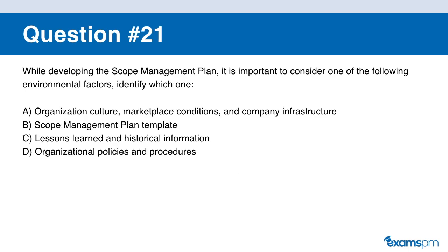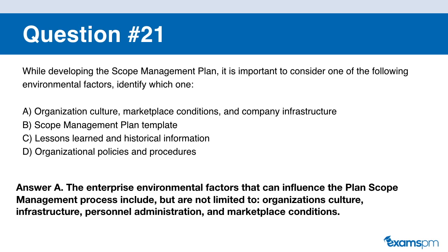Question number twenty-one. While developing the scope management plan, it is important to consider one of the following environmental factors — identify which one. A: organizational culture, marketplace conditions, and company infrastructure. B: scope management plan template. C: lessons learned and historical information. D: organizational policies and procedures. If you said A, you are correct. Enterprise environmental factors that influence the plan scope management process include the organization's culture, infrastructure, personnel administration, and marketplace conditions.